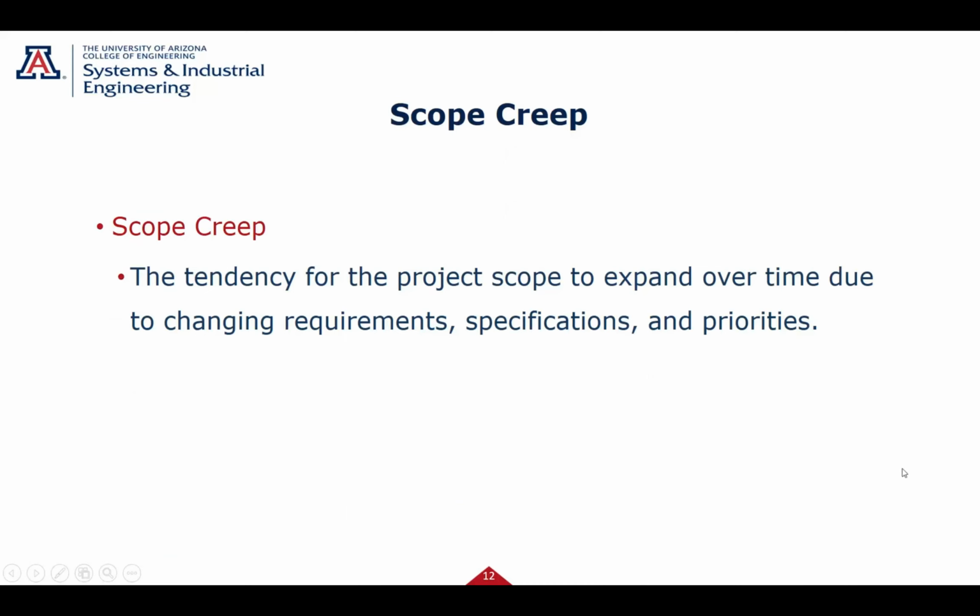Got to be aware of scope creep. We're going to talk about this several times during here. What you have to be really careful of is you're going to define the scope up front. Okay, this is the scope of my project. Watch out for customers changing that scope. And that's what we call scope creep. You and I might do that in our house. Oh, I love the cabinets you're putting in and you're doing this and that. How about if you add this and do that and do that? You've just given your contractor scope creep.